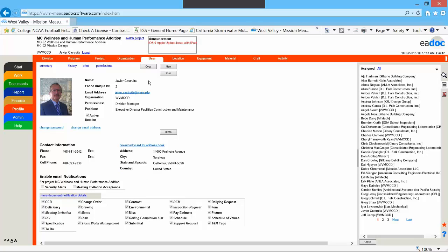Excellent. And you can also, Craig, under the alert section, set up reminders based on due dates. So if that pay estimate says it's due at the end of the month, you can set up a reminder that says, if it gets within 2 days of the due date, start giving me a daily email tickler. Until that pay estimate gets approved, it will generate a daily notification to you through email, and you can also do dashboard notifications.